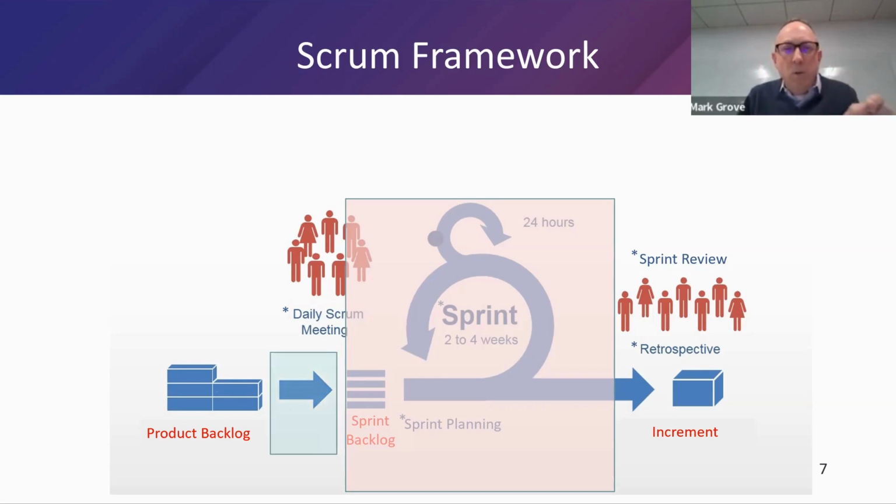I want to really look at, well, what's going on with this arrow here? We have our product backlog. We have this arrow. And I'm going to put this dark black line there, and I'm going to take a little bit of a leap to say that between that arrow and between what we're used to showing visually is probably where our definition of ready needs to sit, right? So something is happening between the product backlog before we bring it into a sprint. At least something should be happening, okay? And that's probably your backlog refinement. And we probably have a DOR, a definition of ready, that sits in there somewhere.